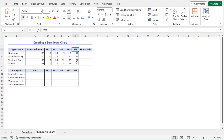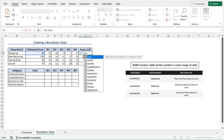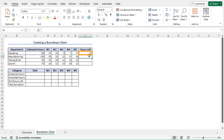Now I will calculate the summation of the amount of work done by an individual department across the five weeks and compare that value with the targeted work hours — that is the estimated work hours — and calculate the difference in the hours left column. To calculate the work hours yet to be completed by the designing department, go to cell I5, type equal, select the estimated work hours for this department (cell C5), press the minus sign, then use the SUM function to calculate the total work done by this department in these five weeks. Select cells D5 to H5, close the parenthesis, and hit Enter. This returns 22, which means 22 hours of equivalent work are yet to be completed by the designing department.